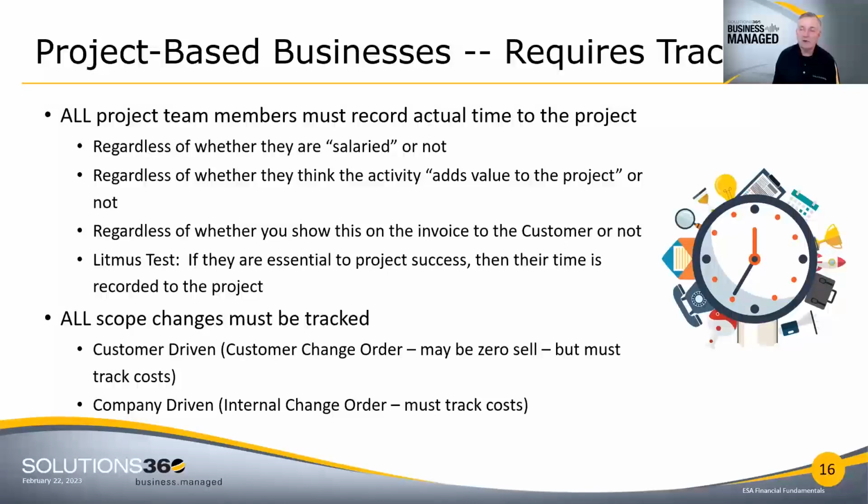You can have a customer requested change order that you decide to give them for zero price. That's okay. But it doesn't mean that it has zero cost to you. If it has a cost to you, regardless of whether you charge the customer or not, you have to create a change order. The customer versus company is simply an allocation of responsibility of who made that decision. And so even if you get in the habit of giving change orders away to your customers to placate them or retain them or whatever excuse you have in your head about why you would do that, please, please, please track the cost to that change order.